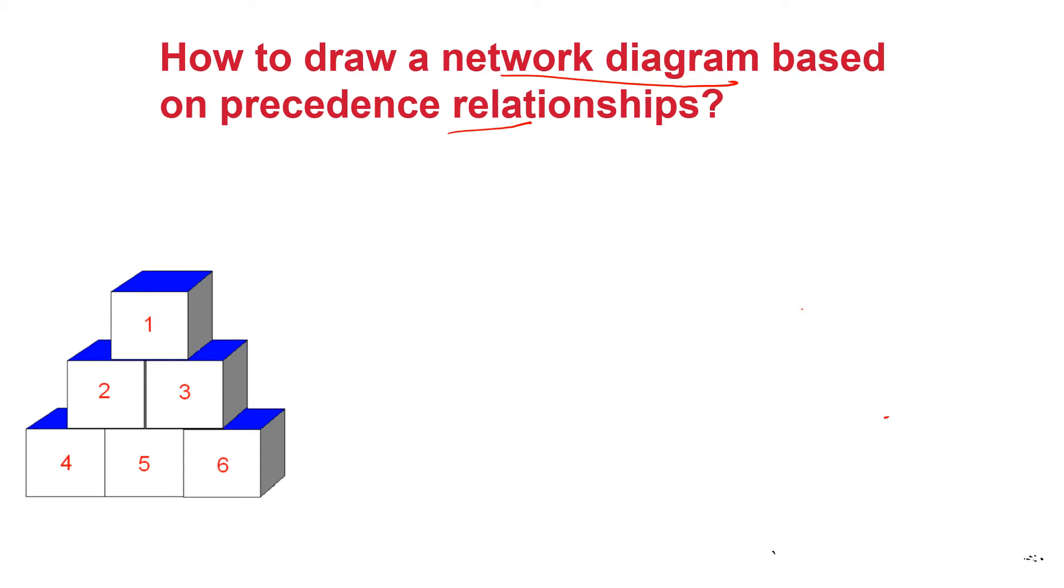Very often children going in a kindergarten are asked to develop some simple exercises like this as it helps in building their logic and understanding their relationships. So if we see how this pyramid is constructed you would notice that you cannot place block 2 in its position unless and until block 4 and block 5 are already in place.